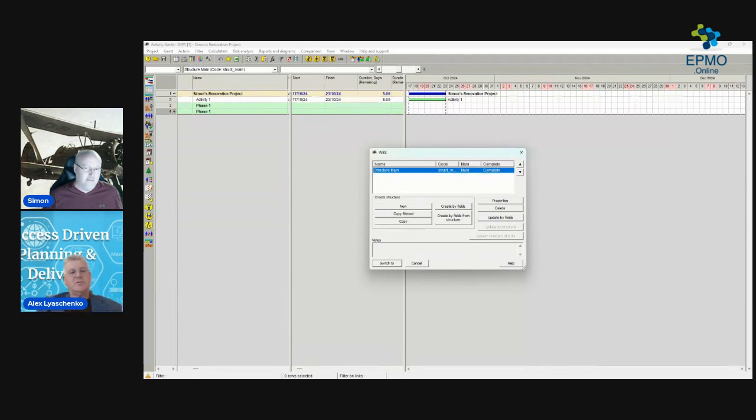Yeah. So does it have a RASCI type feature, like on this activity, this person is responsible, this person is accountable, this person gets informed? You can have, of course, you can create columns and say this RASCI on that, but what does the responsibility breakdown structure do? It defines who is responsible for which part of the project, including doing updates. So you can do contractors, subcontractors, sub-subcontractors. So you can do this matryoshka type easily, and then say, okay, I'll send it to my contractor. The contractor splits it for two sub-contractors. They update their schedules. They send it to the contractor. The contractor pays their part and sends it on.